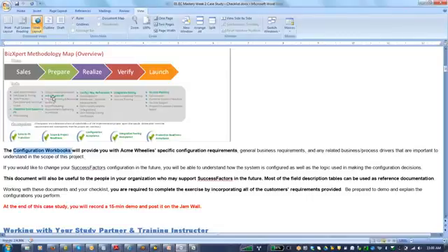preparation, kickoff workshop, project planning, resourcing, kickoff meeting, and gathering the requirements, basically getting the configuration workbooks done that we talked about. Then comes the actual configuration, data migration, unit testing, verification, and cutover and go-live. So it's a typical implementation. Depending on the client, it could take anywhere from 2 months for small projects, 3 to 4 months for mid-sized, and 6 months for large projects, depending on the size of the implementation. So with that,